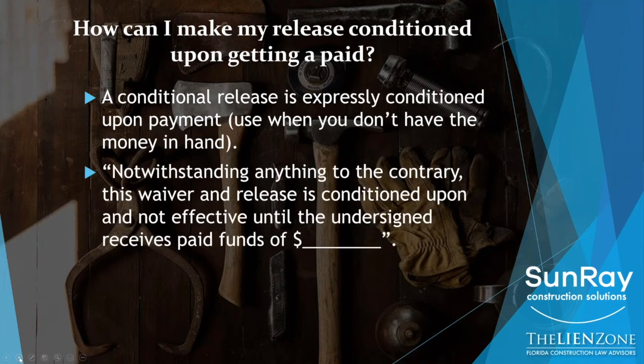You can write this on your release. Notwithstanding anything to the contrary, this waiver and release is conditioned upon and not effective until the undersigned receives paid funds of blank. So if you're expecting a $50,000 check, you would write $50,000 in the blank. You would write this on the release. You can write it by hand. You can type it, however you want to do it. And what that will do is make the release conditioned on you actually receiving those funds in hand. So you can provide a release via email today that's conditional, knowing that until you get the check, this conditional release is no good.